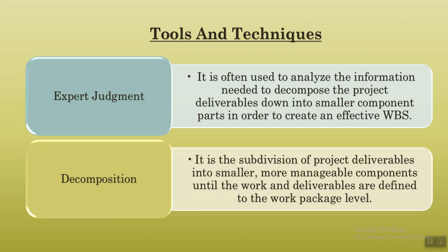Here we have three ways to do it. First, we do the decomposition of some deliverables until the uncertainty is clarified. Until that, we wait. There is an 80-hour rule here, which suggests that a work package should take approximately 80 hours worth of effort to complete.